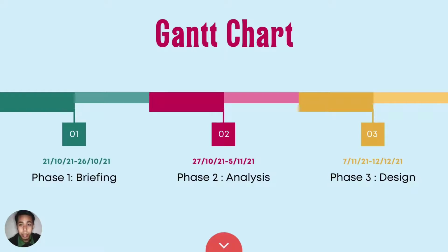Phase 1 contains creating the proposal, HQ, PDS, survey, and so on. Phase 2 is about the analysis that runs for almost 2 weeks. Among the activities are survey analysis, choosing the design, choosing material, and finalizing a design. Phase 3 is a design. This section involves 3D and 2D drawing for the plan we have chosen. It is estimated that this phase will take 5 weeks to complete.